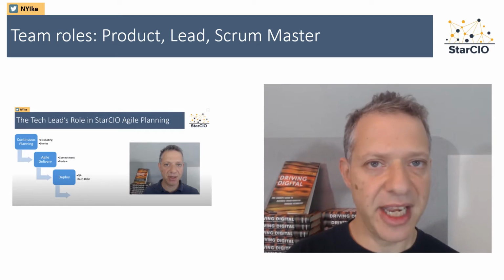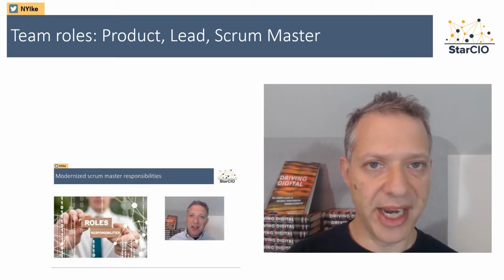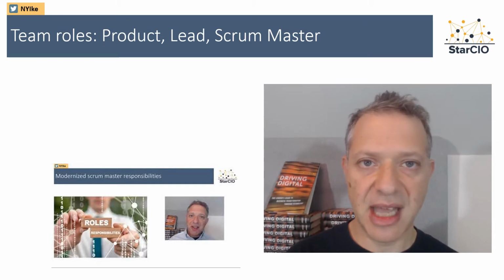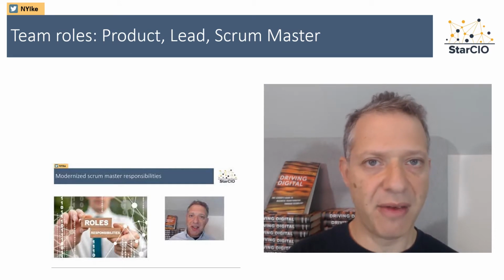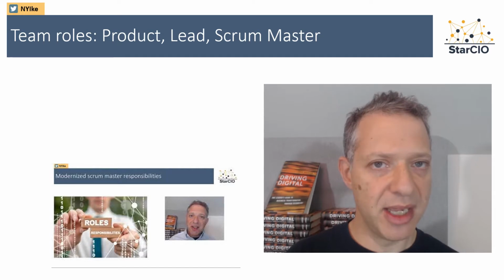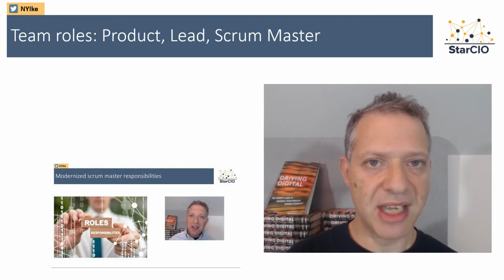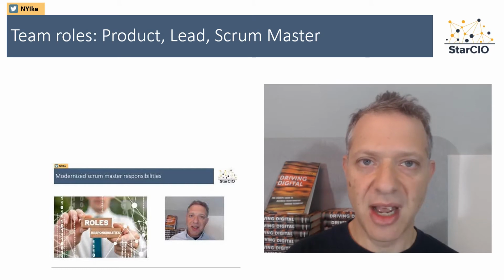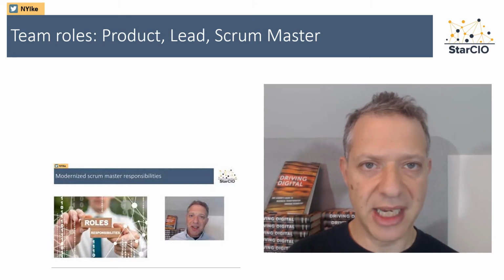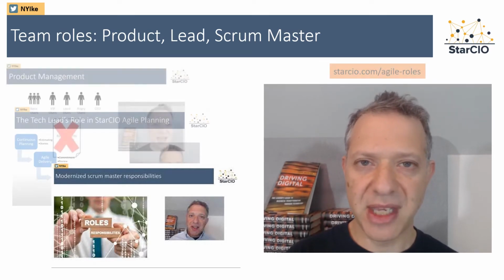The entire team is working with a Scrum Master, and that may be a person assigned that role on the team or a set of those responsibilities. Scrum Masters are there to really help team cohesion, handle running the stand-ups, handling blocks, making sure the team has what it needs to accomplish the sprint and later the release on schedule, on quality, and as best as they can on scope. Now, I've covered all 3 of these roles.